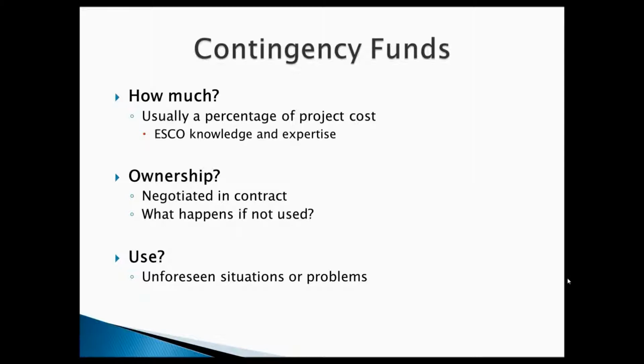What I would advise is that the customer owns the contingency funds. And the reason for that is if the contingency funds are not used, they can be used to help pay off the installment loan. So ownership of those funds is very important, and that's why I put it in with your meetings on the approval of the use of contingency funds. If the customer owns those contingency funds, they should approve the contingency fund use.